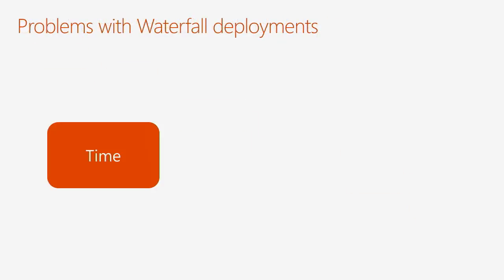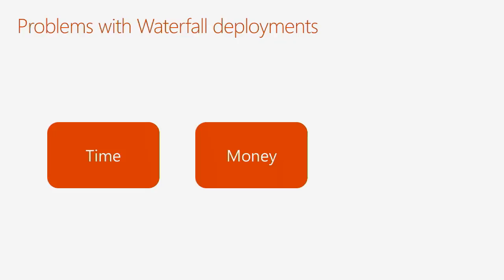So what are the problems with waterfall for us? Waterfall takes a lot of time. It's critical that you have all the right artifacts, like requirements documents, written correctly and approved by everyone, because the project scope is tied really rigidly to delivering those requirements. Waterfall is quite expensive because you spend a lot of time estimating, getting approvals, writing business cases, doing justifications before you can move on to the next step. You need teams of people to make sure that the process is followed properly and all the requirements are met. This adds up to projects that aren't cheap to finish.